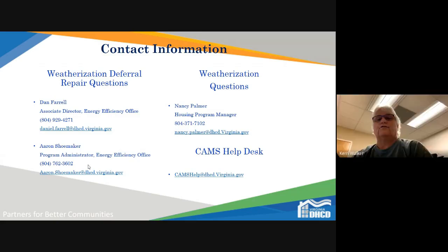Yeah. I think there's going to have to be some trust between us and the agencies, because a very common thing is a roofer's literally on the roof and we find out there's more sheathing damage than they thought. We need to approve that really quickly, because we need to keep them moving, and we sure don't need them pulling off the site for a couple of days while we're getting a change order approved. So I hope we're going to be able to figure out an efficient way to turn that around pretty rapidly with you all, or maybe you've already thought of it.